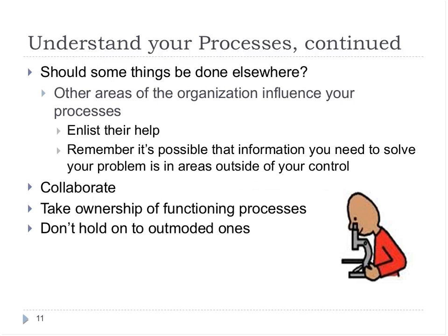Really important, particularly on that communication side, to make sure that we're meeting regularly, absolutely positively. We want to share progress. We want to assess where we are. We want to see where we are in terms of the project plan, and we want to see if we've got any problems and hash out the problems before they get too big. Sometimes what happens is one area is falling behind when the others are doing well, and if we don't get together on a regular basis and see what area is falling behind, then we're not going to be able to redirect the resources that we need to that area so that we can get that area up to speed or resolve whatever that problem is. Talk about having meetings on a regular basis, particularly when you're involved in implementing the project along with all the other work you're going to be doing.